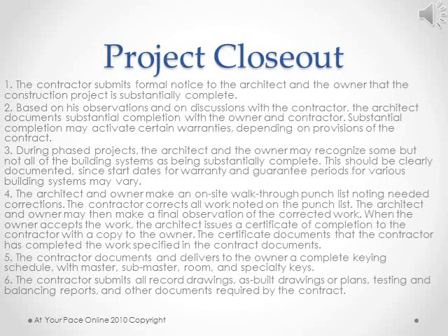Step 3 is, during phased projects, the architect and the owner may recognize some, but not all, of the building systems as being substantially complete. This should be clearly documented since start dates for warranty and guarantee periods for various building systems may vary.